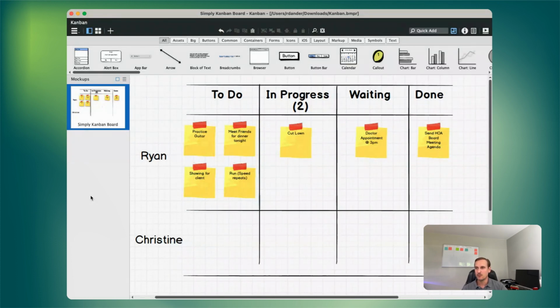To do Kanban by the book, you would definitely want to add these in to one or all of your columns. Now, that being said, you can also add them into your to-do, waiting, and done. Typically, done doesn't make a lot of sense because that's just your completed work. Waiting and in progress are probably the most beneficial columns to add it to. To-do, I don't find that super beneficial. I wouldn't personally add it to the to-do, but some business groups do add a limit to the to-do so that they limit what requirements are seen in the backlog.